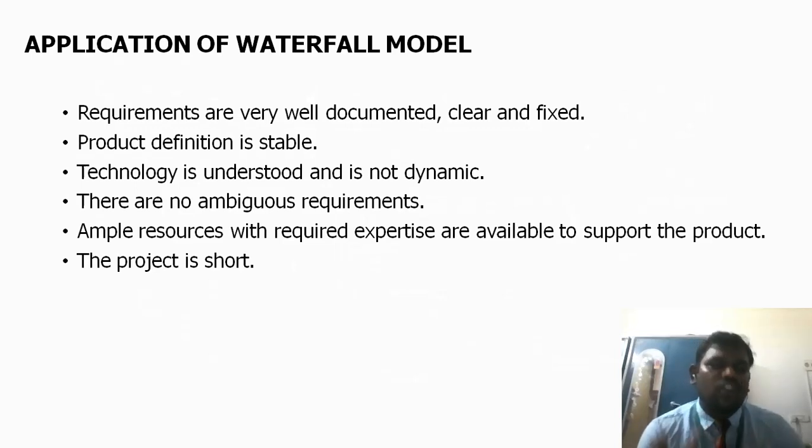Now, the application of the waterfall model. Requirements are very well documented, clear and fixed. Product definition is stable, not dynamic. It's a stable, static form only. Technology is understood and is not dynamic. There are no ambiguous requirements. Ample resources with required expertise are available to support the product. The project is short. Only for a short project do we apply the waterfall model.